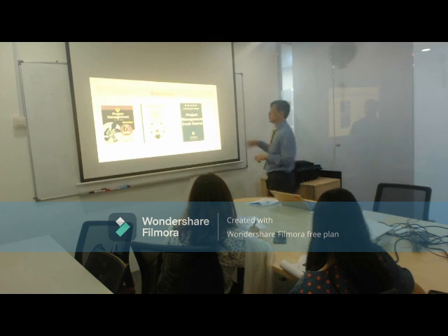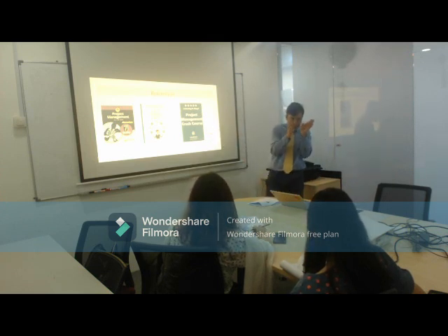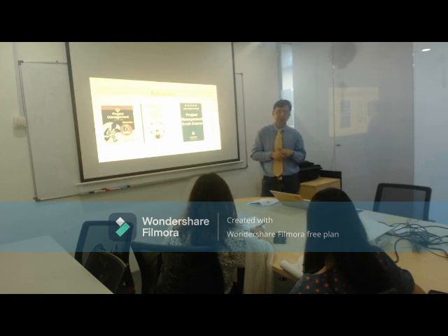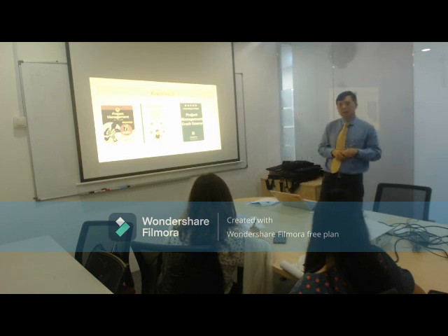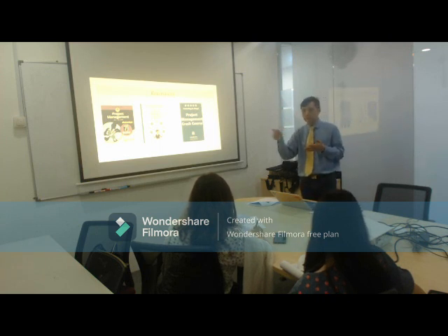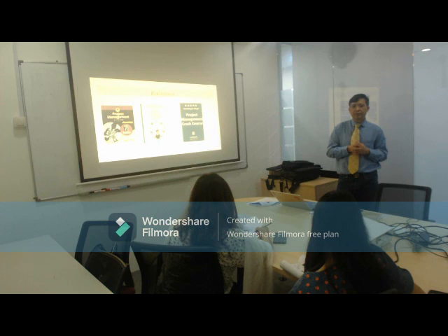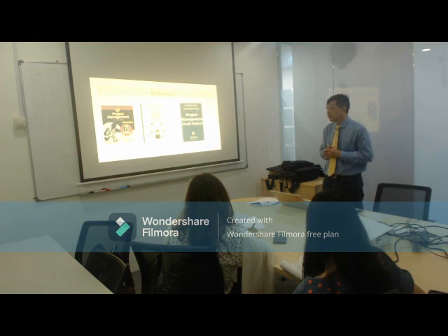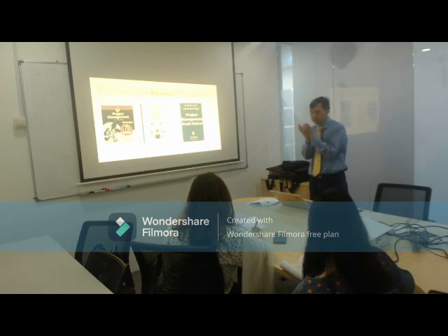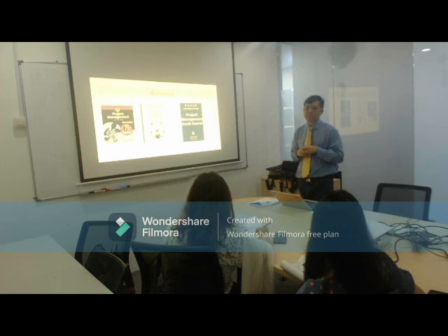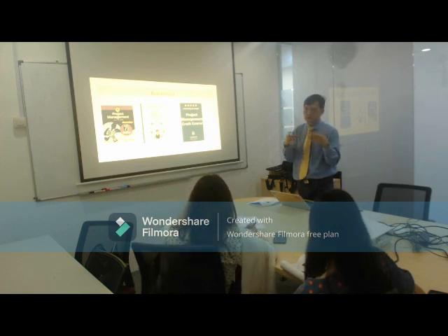Execution is normally taking your timeline, your Gantt chart, and updating it periodically. You record your meeting minutes. You have expenditures, where you buy things, return things and all that. All those things you have to record. Those are the things in your execute. There are many things in execute. You may also have something called a work breakdown structure, which you will see at another time. It will say that one sub-activity is to be completed. For each subtask, you have to mention that this subtask is completed.